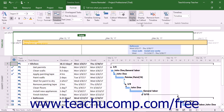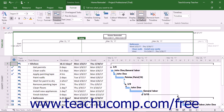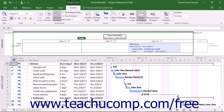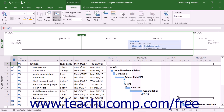The buttons in the Current Selection button group on the Format tab of the Timeline Tools contextual tab in the ribbon let you change the appearance of selected tasks or delete tasks from the timeline. You can click either the Display as Bar or Display as Callout buttons to show selected tasks as either bars in the timeline or callouts that appear above the timeline. You can click the Remove from Timeline button to remove selected tasks from the timeline. The tasks will still exist in the project file and can still be seen in the Gantt chart view.